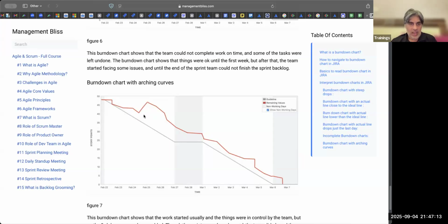Although they had a scope creep, and were going slower than the ideal rate, the team was very good. They were able to complete their tasks well in time, and they are consistently updating their Jira tickets also, and the stories are also smaller, which is why you see everything declining. There are very few horizontal lines. Horizontal flat lines are the problems.